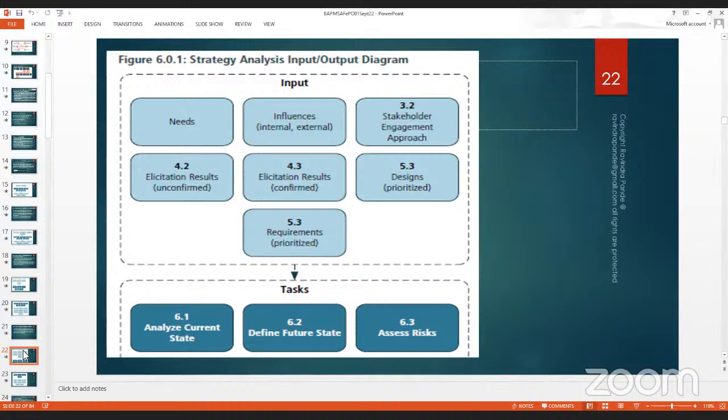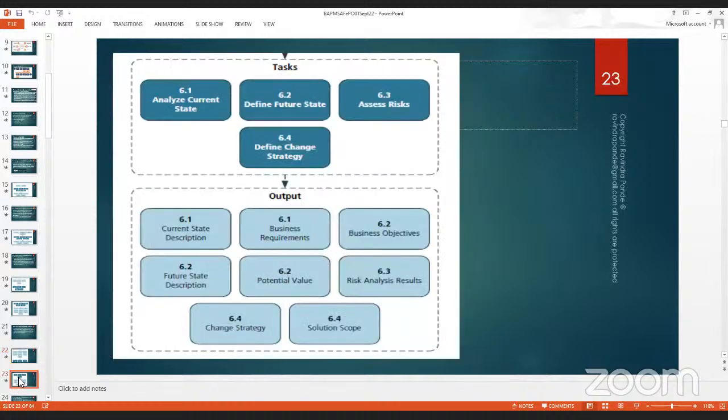So I might label the biometric box as handle with care, and there are risks attached to it. Whenever in transport, if something gets damaged, I might need to have an extra biometric sensor handy, so that I can at least complete the work at hand. Such kinds of risk I already include in the risk table in my SRS document. This way I keep building the requirements in their conciseness and completeness.